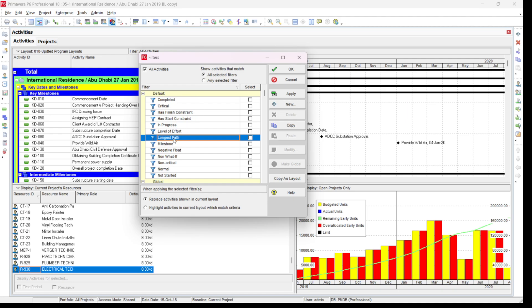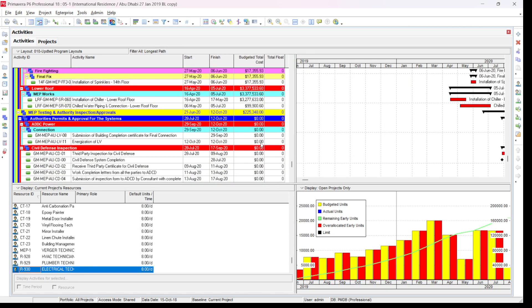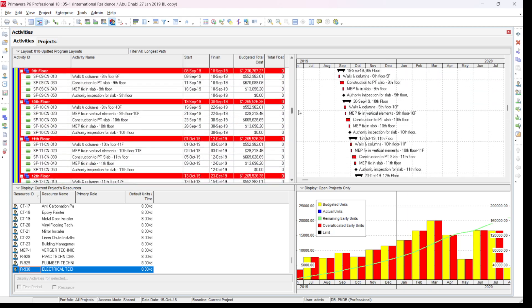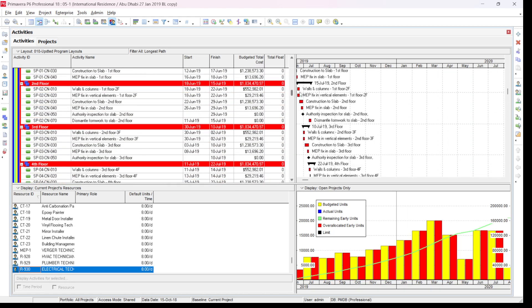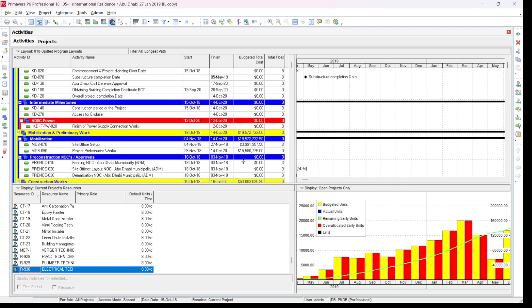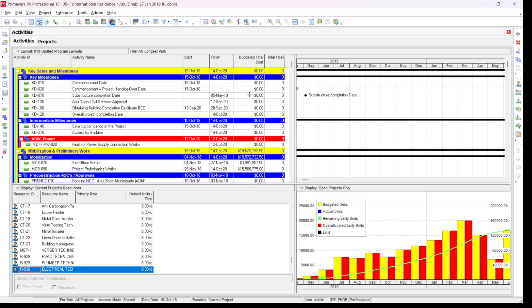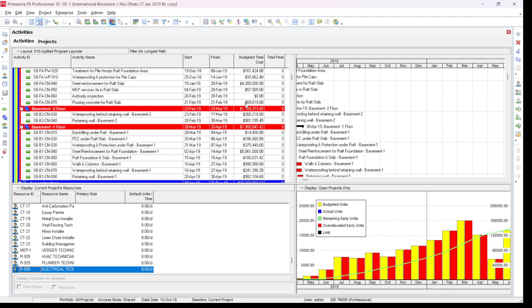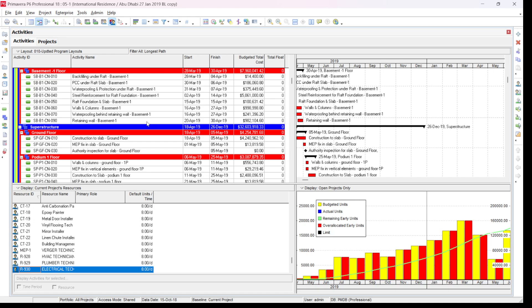For example, for this project I want to see the longest path, so I just click on 'Longest Path'. Once I click on it, the 'All Activities' checkbox will be removed and it is replaced. It will show only the critical path activities. If you click it, you can see that all the activities having zero float — which are on the critical path — will be shown. The program is now showing only the critical path activities, not all activities.